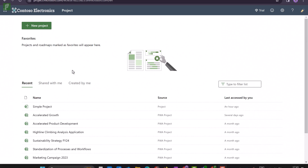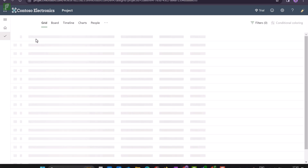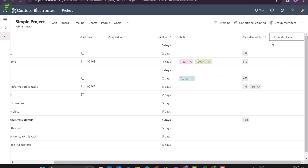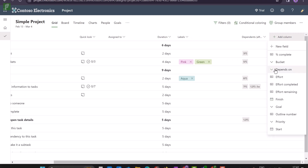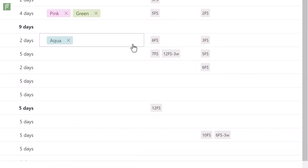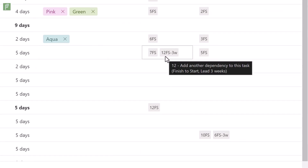For the second update we're actually going to go into Project for the Web itself. We have a simple project that we started using the template, and this new feature in Project for the Web is one that we've all been waiting for ever since we had the four different types of dependencies available in the system. We now have the option to add lead and lag time inside our dependencies.